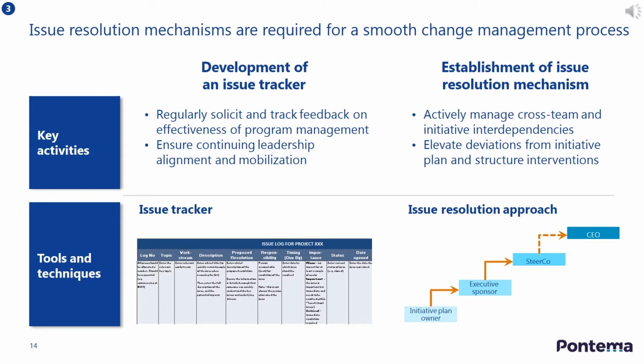You should encourage initiative plan owners to identify and resolve any issues and risks themselves. Any unresolved issues are to be escalated up through the executive sponsors, then to the steering committee, and as a last resort, the CEO.